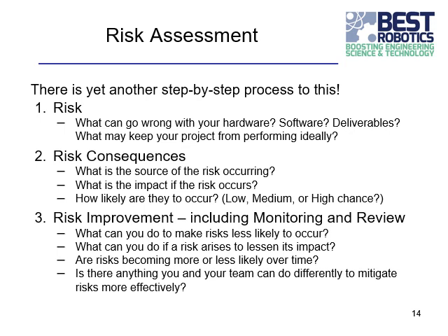So using the wheel example of not getting traction, the risk is your wheels spin without moving. And so that would be a friction component. Your wheels don't have enough friction. What's the impact if it occurs? You don't move, which is not good if you need to move to score points. And how likely is it to occur?